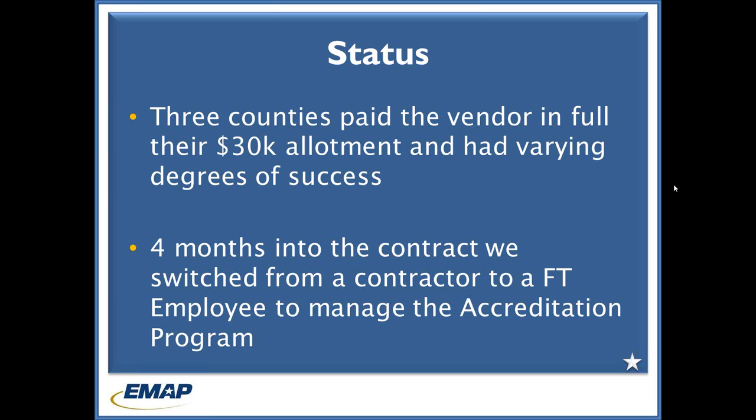We realized that having a contractor who was from out of town, way out of town, and just the travel constraints and the logistics, it just cannot compare to somebody who is on site. And I think Otis can certainly attest to this. Having a full-time person on site who's paid and dedicated to this project alone for a period of time is invaluable, and that's just something the contractor, in hindsight, couldn't provide to us.